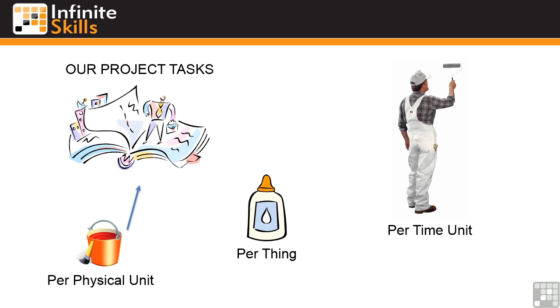So we say, okay, which of our tasks require paint? And how many tins of paint does each of those tasks require? Which of our tasks require the painter? And how much of the painter? A full painter, 2 painters, 1.5 painters for each task. Now, the cost task type is assigned to tasks, but the value is then attached at that stage.